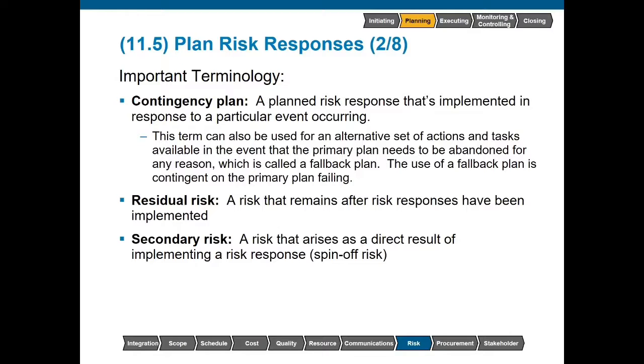We can also introduce a secondary risk. A secondary risk is one that arises as a direct result of implementing a risk response. Prior to starting that campfire, the risk of a forest fire was very low. However, by introducing that fire, all of a sudden we've now introduced a secondary risk.